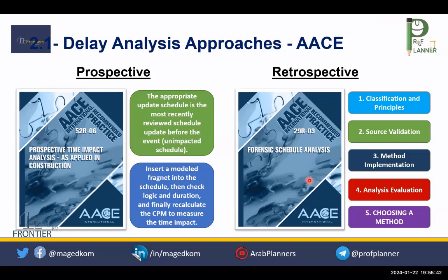If something happens now, like they say to us, okay, we will not continue the project, who will pay for the excavation work? So we would lose. It will be like a quantum meruit claim, because it was under our risk. So as I told you, it's a financial claim more than an extension of time claim.